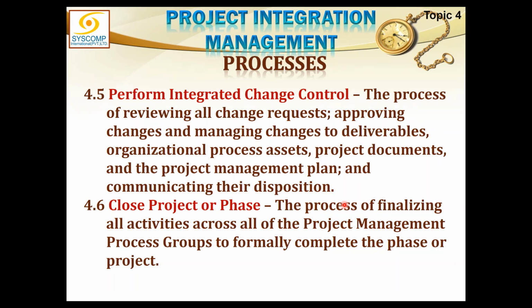Now, between the execution and monitoring and control, if the things are not turning the right way, if there are uncertainties and plans are continuously changing, then the change requests are being moved and the plans are updated, and therefore we will keep rotating between execution and monitoring and control until the objectives of the project are met.